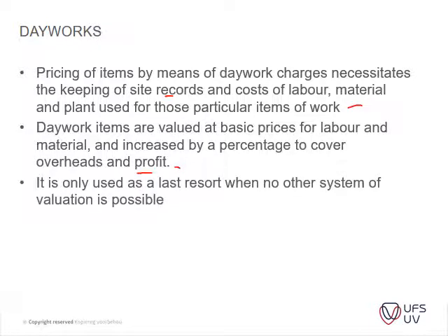It is only used as a last resort when no other options or valuation is possible. Okay, so you can see it's just a lot of admin, and it's usually difficult to keep track of. If you've got a good site presence, like the civil engineers usually have, or on engineering projects, it's much easier to implement because you've got someone from your side also looking at the implementation of that item.